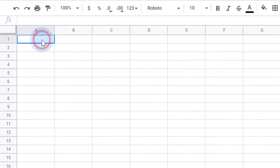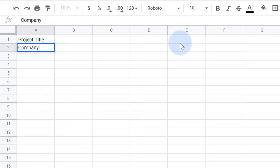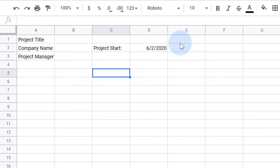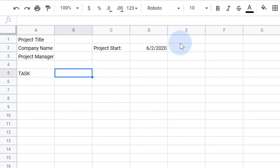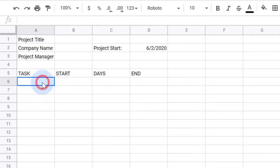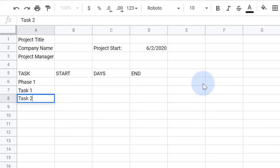First off, I'll add the basic information we'll want, including a spot to enter the project start date. The critical information for a Gantt chart is a list of tasks, each with a start date, the duration in days, and the end date. We typically group tasks within phases or categories, so I'll add four tasks under phase one.